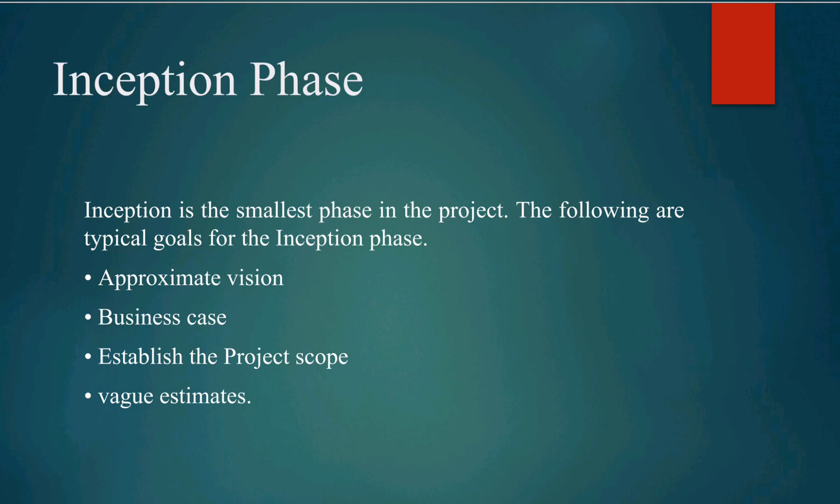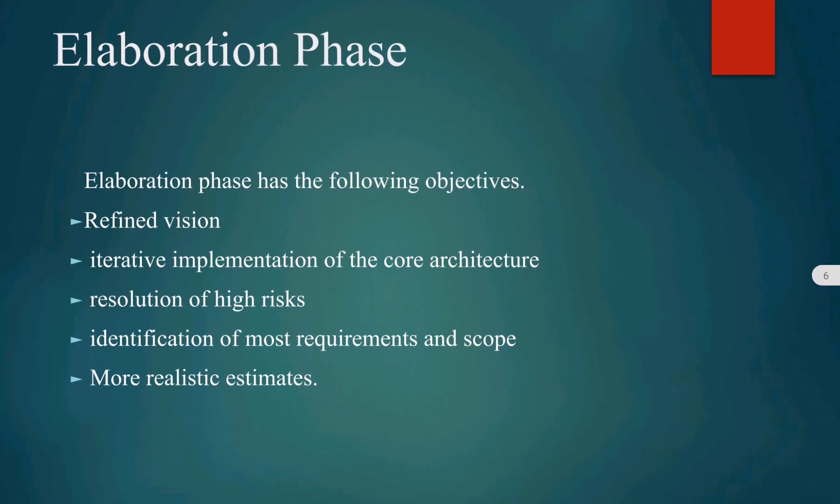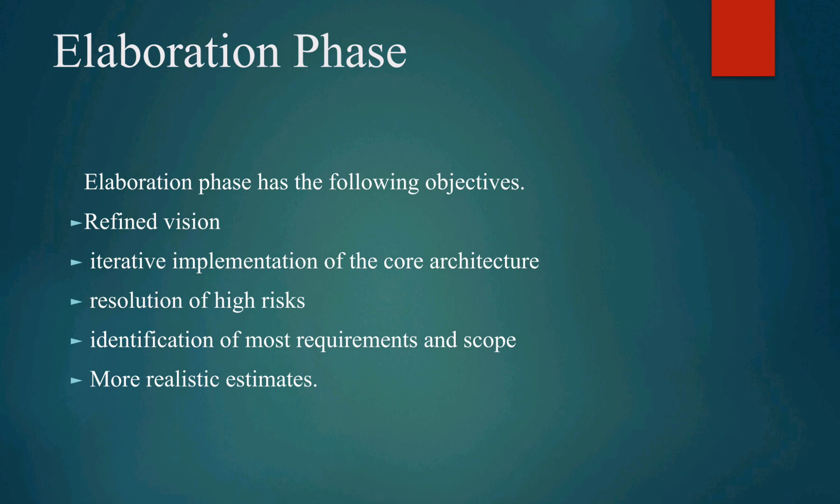During the elaboration phase, a refined and complete final vision is defined. All the core architectures are designed in this phase. The high risks are identified and addressed. Identification of most requirements and scope — what is the input and what is the output — is defined. More realistic estimates are made, compared to the rough estimates of the inception phase.